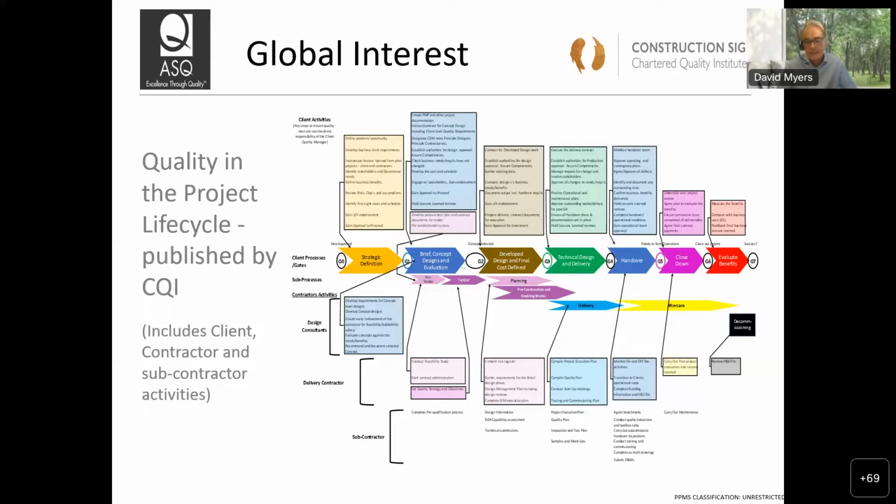We started talking, and we all agreed that, as with the GIRI conclusions, over 50% of the defects that emerge during the construction phase can be tracked back to the design. So we all agreed design was critical, but we also recognize that in construction today, there are lots of quality metrics around delivering a project on site, and very few quality metrics around the design phase, as Helen was describing at Heathrow. Hence, this little group of experts decided to focus on the design phase and what we could do to drive quality in that area.